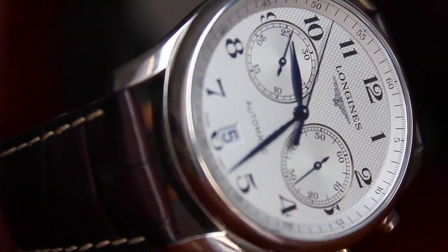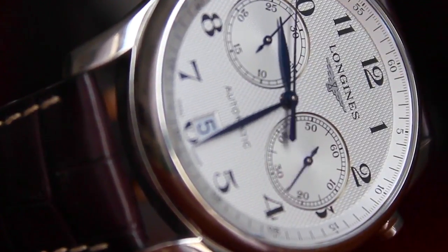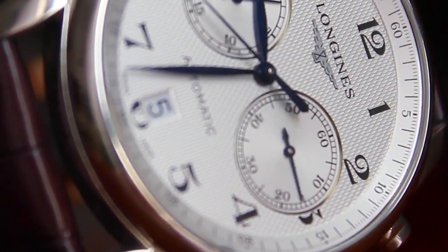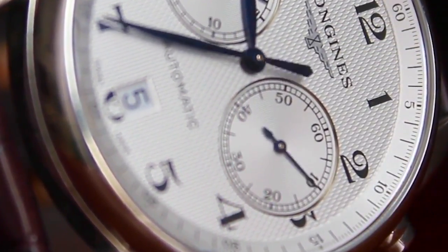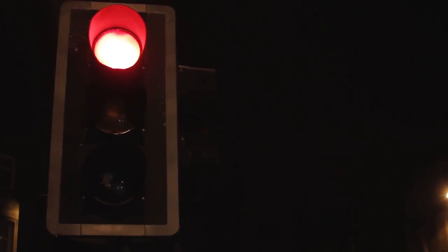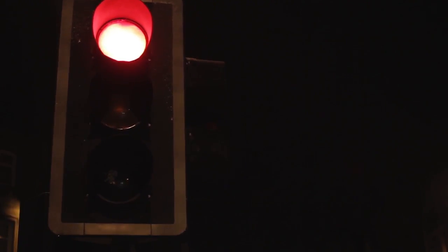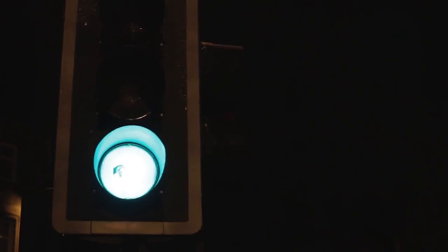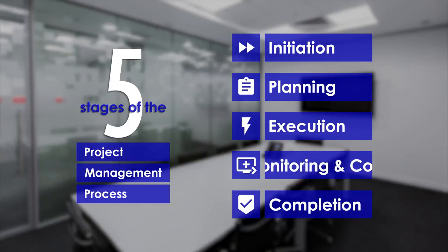However, if the sponsor still wants to add on the new tasks, expand the scope, you should let him or her know the overall time and cost of the project will be impacted. The project cost might exceed what was originally budgeted for, and/or it might take more time to complete the project. After you provide the impact the scope creep could have on the project, the sponsor should then decide whether or not to proceed. The project officially begins once your proposal is approved. Then you can move on to the next stage, project planning.